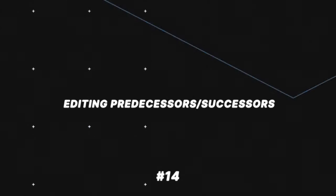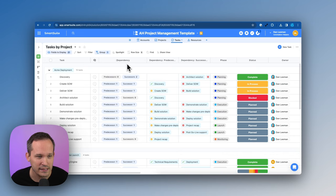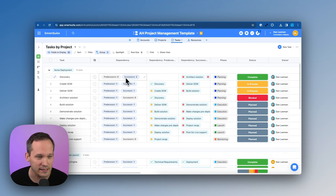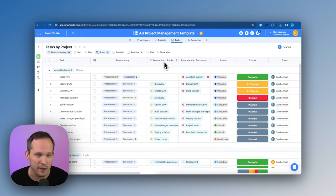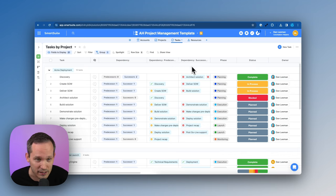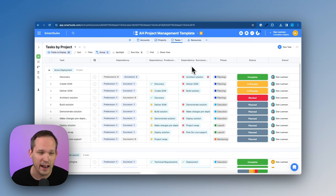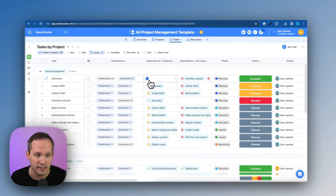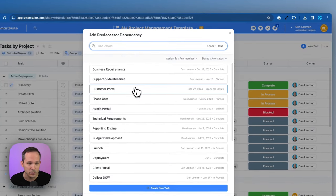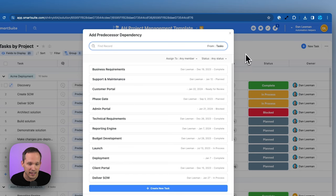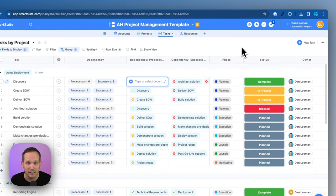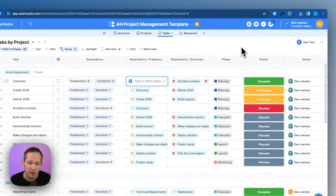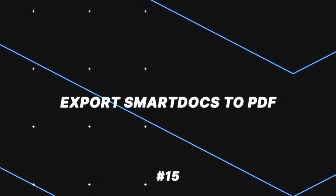Along the same lines with subfields, now that we have our dependencies and we have our predecessors and successors, those can be split as well into the dependency predecessors and the dependency successors field. But now the new addition that we have is that these are actually editable. They behave very much like linked records. So we could press the plus button. We could start typing. We could select those records to now automatically turn them into predecessors and successors.